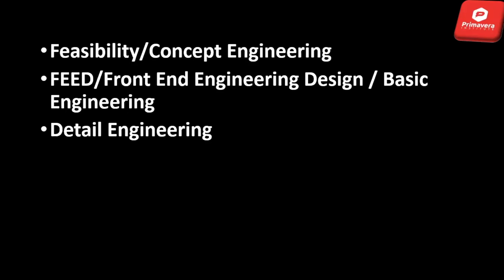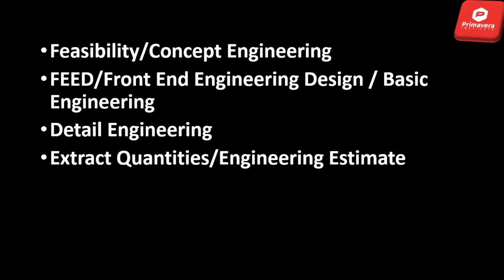You will prepare detailed drawings and detailed design of that product, whether it is a road, a building, a power plant, or an oil and gas exploration project. Once detailed engineering is done, you will extract quantities, and then you will prepare the engineering estimate. That document will serve for bidding purposes.